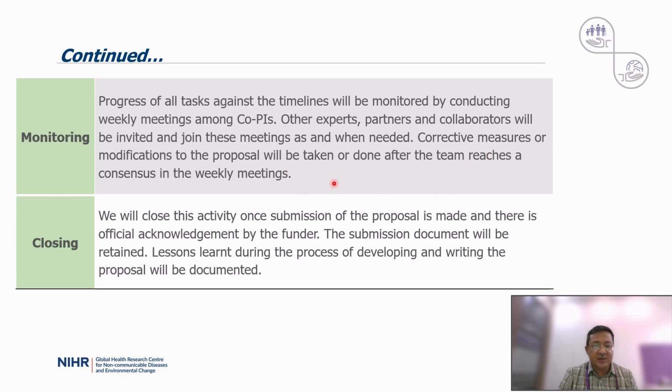Closing would be, we will close this activity once submission of the proposal is made and there is official acknowledgement by the funders. The submission document will be retained. Lessons learned during the process of developing and writing the proposal will be documented.